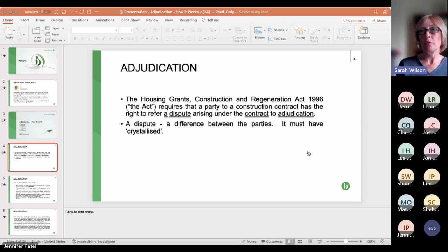Processes with regard to construction for the food industry, pharmaceutical industry, sewage, certain sewage works and water works, oil and gas disputes. So there are a whole raft of process-type works that can't be adjudicated because they are specifically excluded from this Act. And the logic there was that those industries lobbied the government when the Act was being